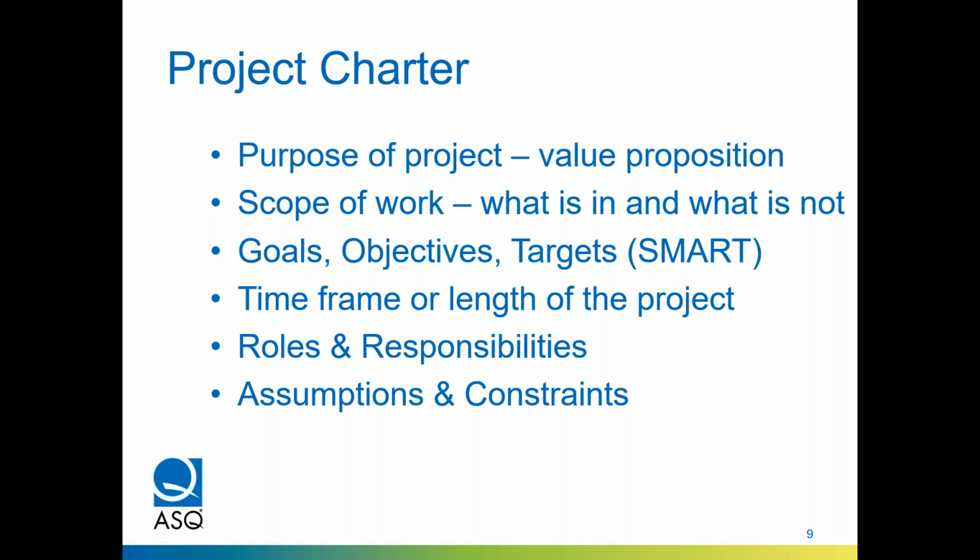And what is not in scope is almost as important, because a lot of times you'll end up with what's known as scope creep, where things will just start adding to the tasks already at hand. And we try to avoid that in order to achieve the project on time.